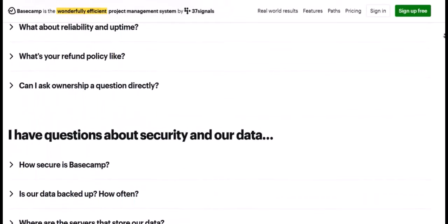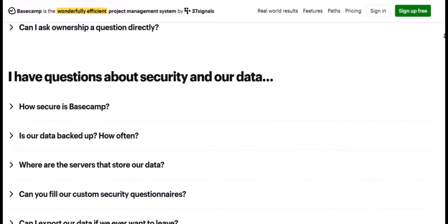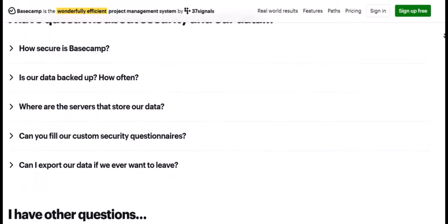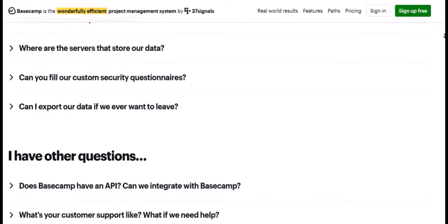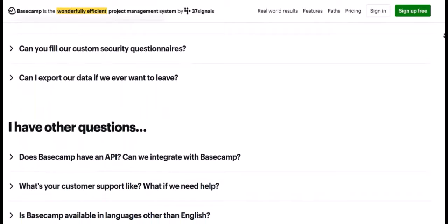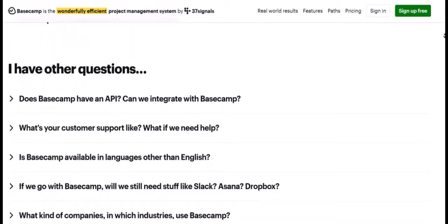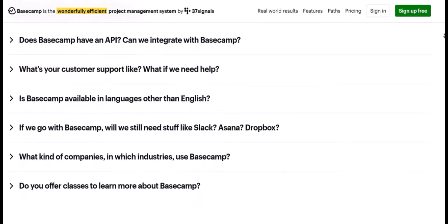What to copy. This is where you select the specific tools and content you want to include. You can choose to copy to-do lists and their contents, including assignments and due dates, which will be relative to the new project's start date. Message board topics, schedules, docs and files structure, check-ins, team members, if you always have the same core team for this type of project.